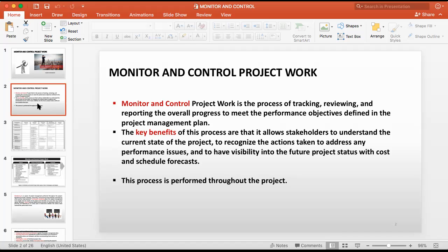This can be your senior management, your internal stakeholders, and your funding agent, the external stakeholders, and other organizations. You have stakeholders, so you can give your progress. So if we are digging a road to do pipe laying, your progress has to be informed to the Ceylon Electricity Board also. Why? They are interested, they are stakeholders, because they also have some projects to do cable laying. So they are waiting until we complete this section. So our progress is important to other external stakeholders also.